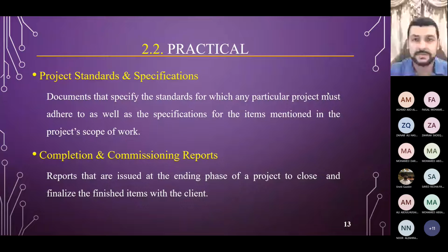For example, lights. You'll have to show him physically that the lights are working, that your connections are good, that the switch is good, the light bulbs are good. It's up to specifications, it's the correct color. For instance, the client ordered yellow colored bulbs, but you've put white to make it cheaper for you, but again, you did not follow his specifications. Whatever the testing methods, whatever the items that the client asks you to do, will be presented in this report in order to complete your project, close it, give it away, and move on.